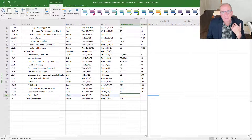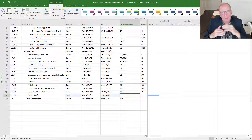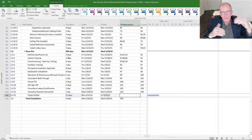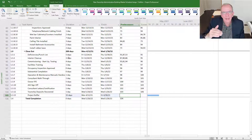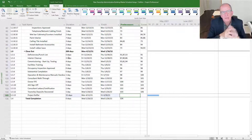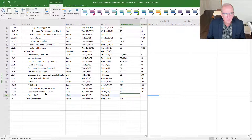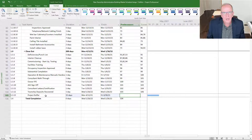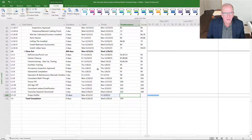In other words, don't schedule something like forming a first floor for six days just to allocate one day for bad weather. You make it the actual time period it's going to take, and at the end — say at the end of five floors — you have maybe a five-day buffer. If you lose four or five days over a five-week period, that can be absorbed from the buffer, while your crews are incentivized to do the work in the real activity durations. Workers who find out you're padding activities are going to take that time up, or they won't trust the time periods you give them. It's much better to be transparent.